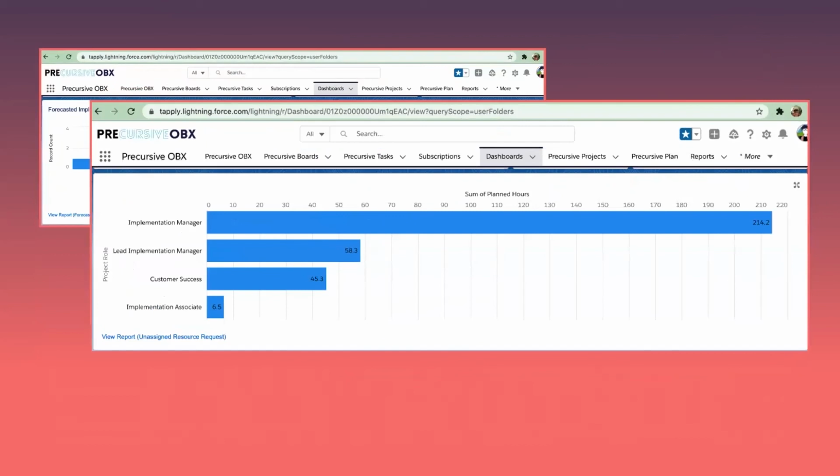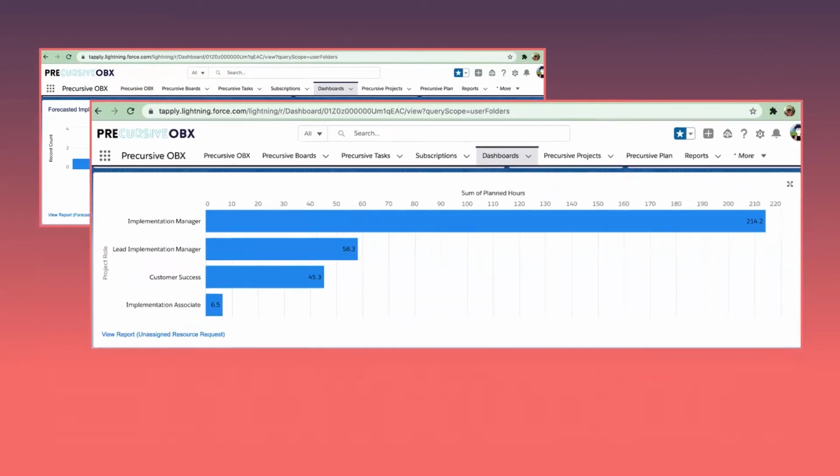Based on that templated playbook that I've got, across those forecasted projects, I can immediately see the total amount of time I need at each role to cover all of those projects. So as a services team manager or a resourcing manager, I'd be looking at this report daily so I know what I'm due to allocate out and then book those resources onto those projects.